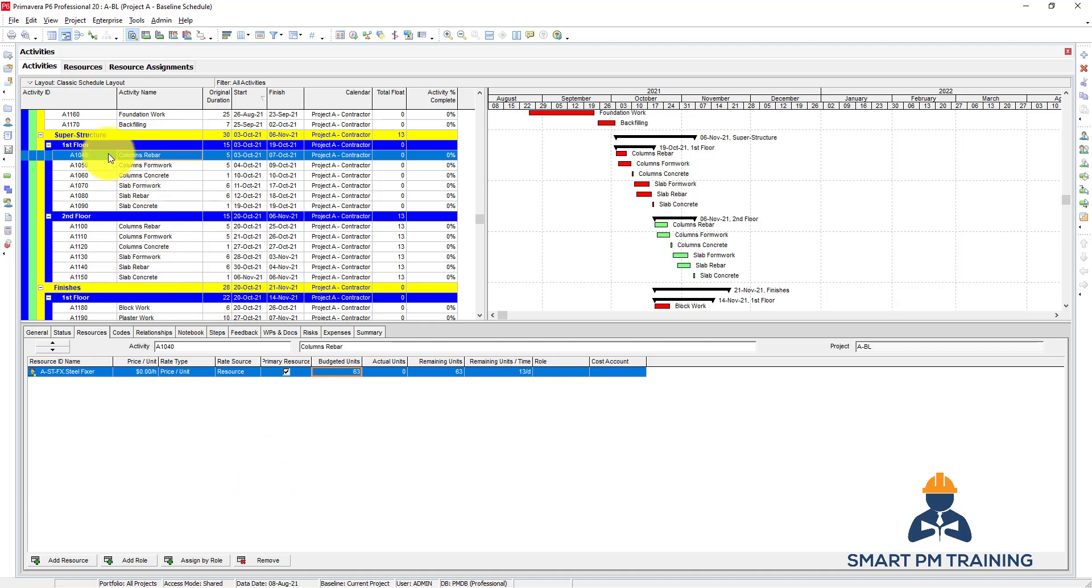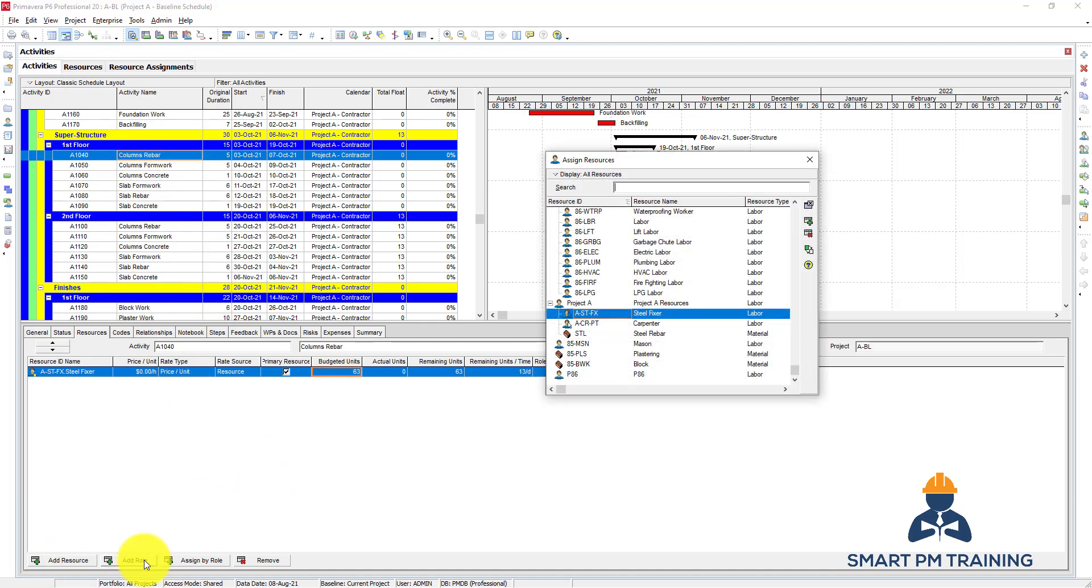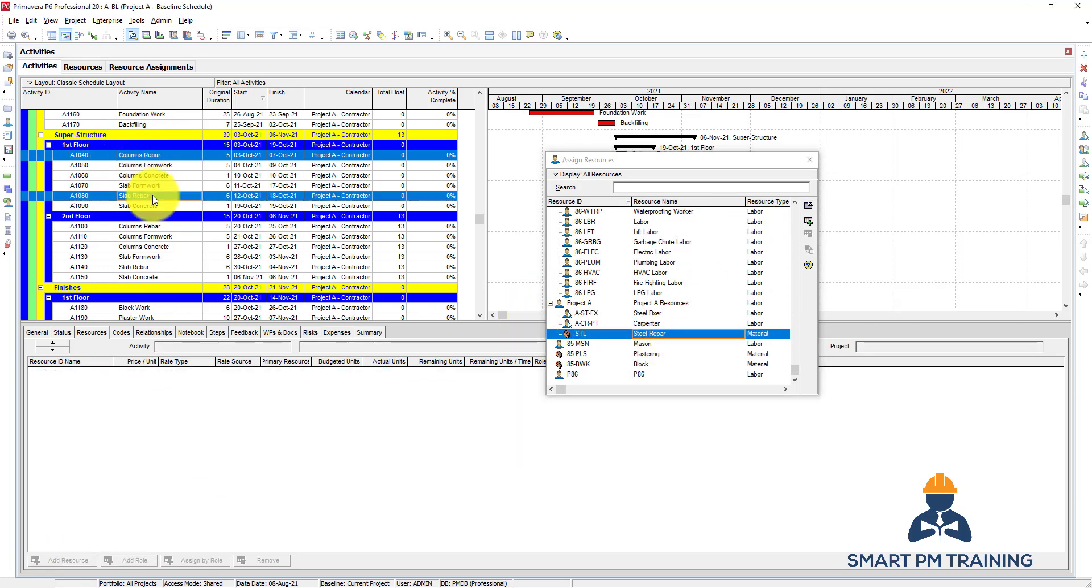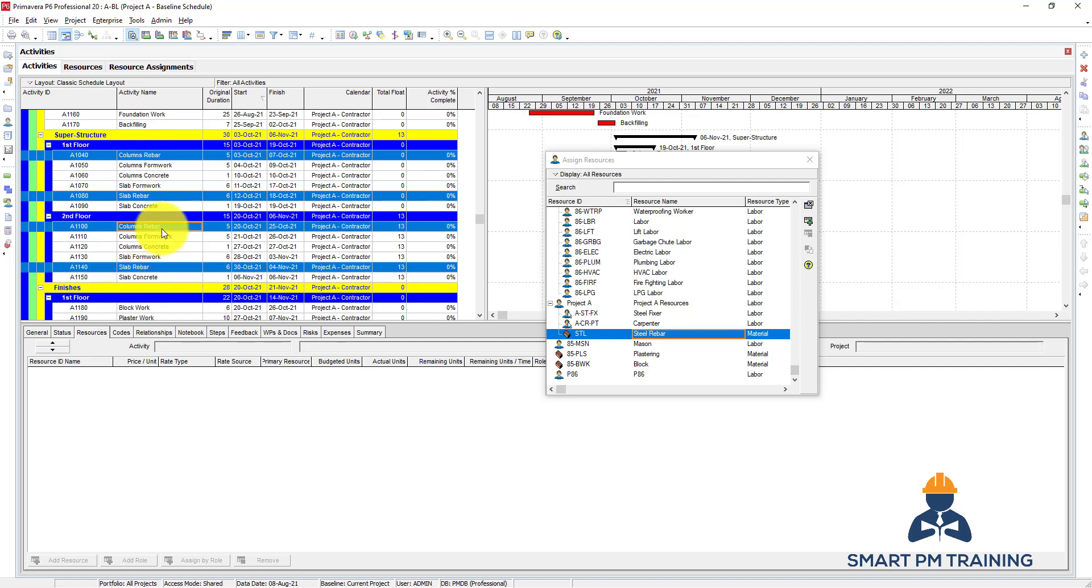We identified the steel also as a material, so let's assign it as well. We have the steel rebar here, so I will select all steel rebar activities, click assign for steel rebar.